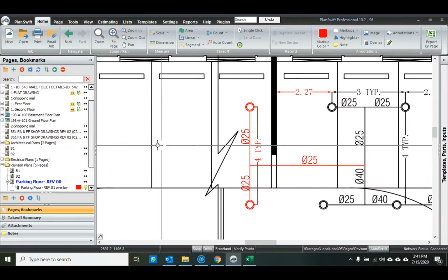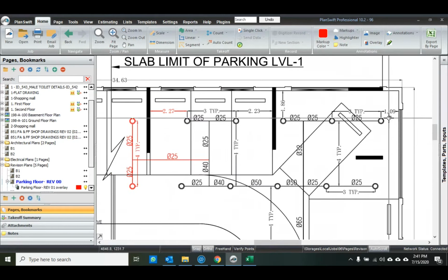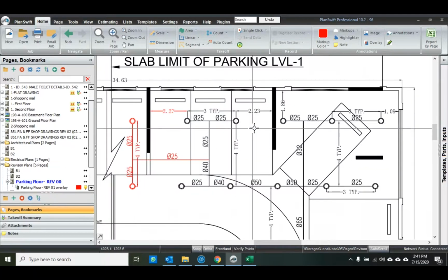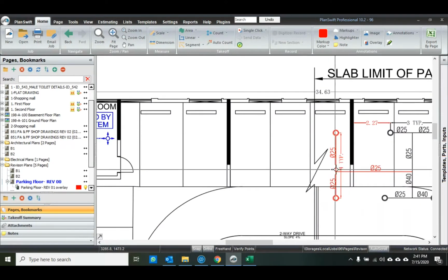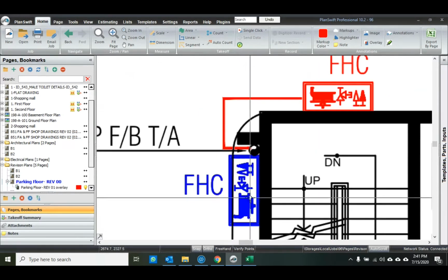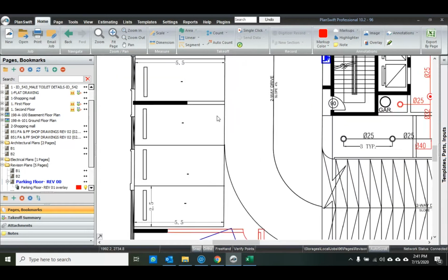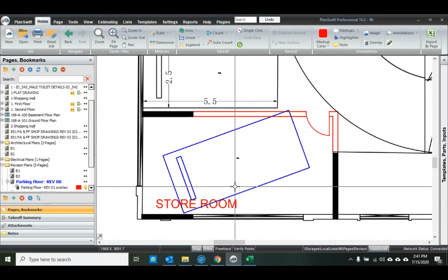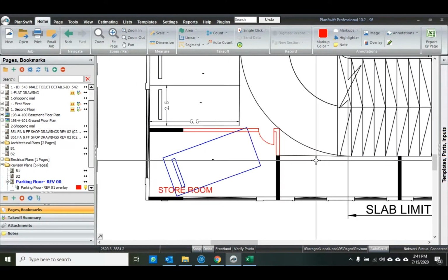Red means additional. Whatever it is, it's a pipe. So we can see here, in this area, this is gray, it's also gray, so two branches same, they just added one more. So only three colors you should keep in your mind. Gray means same, blue means deleted, red means new. So it's easy for you to find what happened here. They added 2 points here. What happened here? They deleted and they added 8, meaning they just shifted. All parking same. What happened here? Blue means deleted, so they removed the parking and made a storeroom. So maybe you can apply some systems here.